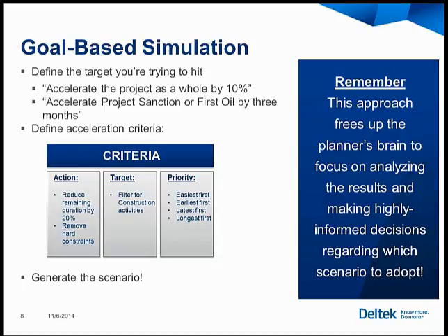Targeting, filtering, in this case, filtering for construction activities. Either filtering on them because we think that's a targeted area where we can make efficiencies, or doing the opposite, saying accelerating construction would bring resource and safety constraints. We don't want those problems, so let's anti-target construction. Let's put a protective shield on construction so that we don't alter their activities.